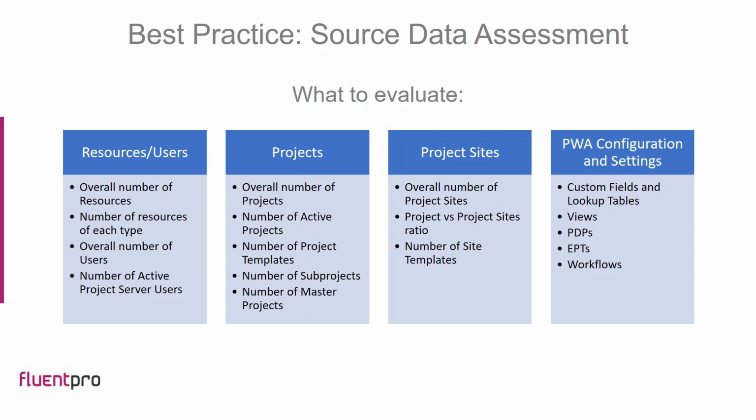PWA configuration and settings. This is a smaller set of data, but it is important to understand that for a successful migration of projects, all custom fields and lookup tables, PDPs, enterprise project types, workflows, they all need to be migrated to the target system for correct data migration for all projects and for keeping data integrity.